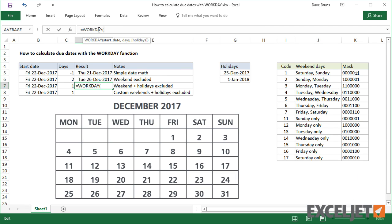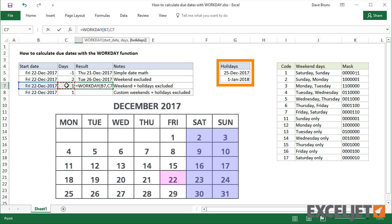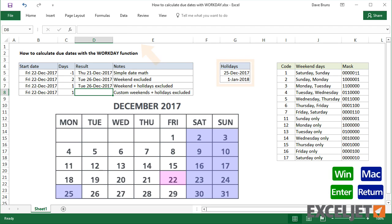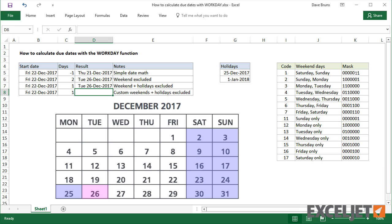To take holidays into account, we need to provide a range of dates that represent non-working days. When I add that range as the third argument, you can see that Workday excludes those dates from the calculation.